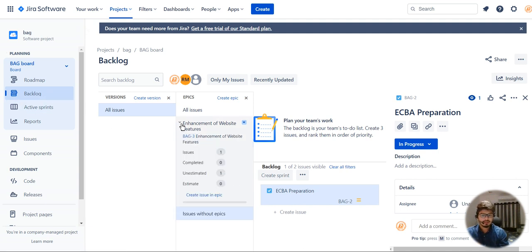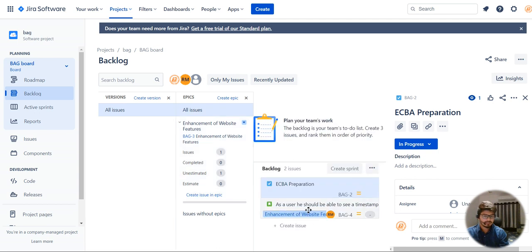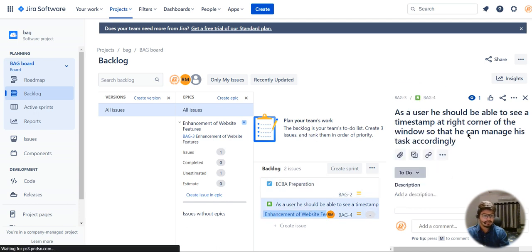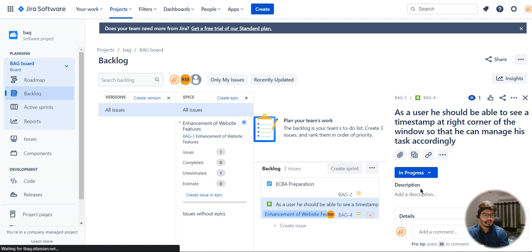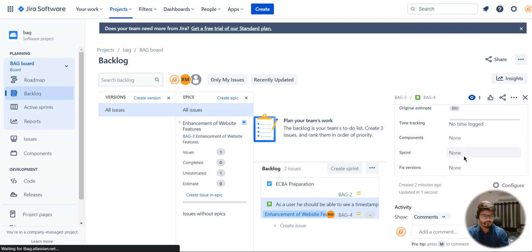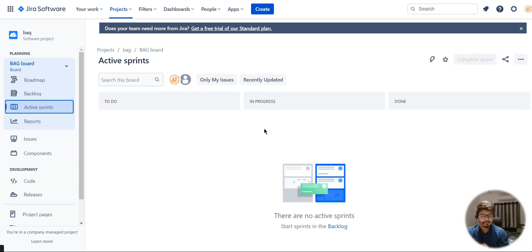If you click on 'enhancement of website feature' — that is the epic — you can see there is one issue under the epic: 'as a user he should be able to do this.' When I click on it, everything is set accordingly to the epic and the epic link is assigned. You need to move this to in progress. This particular story is already assigned to the board callback, but you should not see it under sprints because it's not assigned to any sprint yet — it's under backlog.